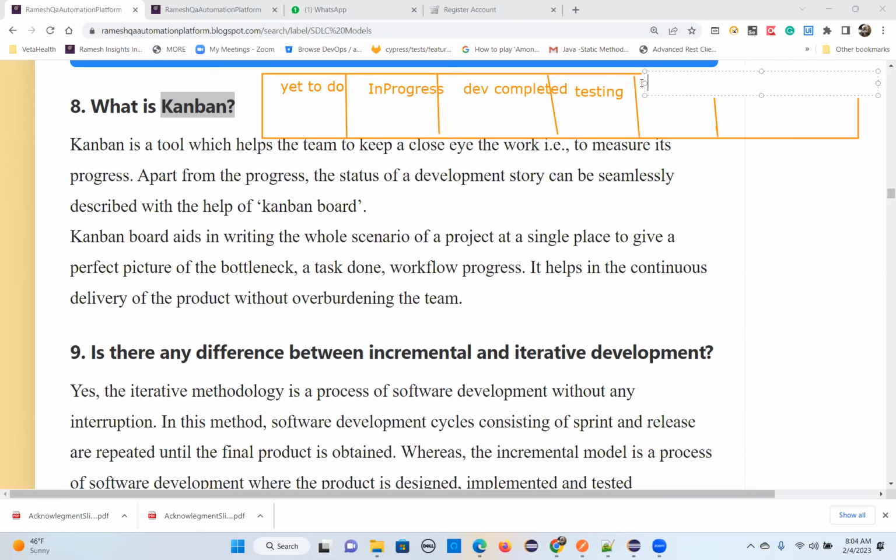So this is review. Then finally it is completed and you can say done. So this is how these different statuses take place, and all these statuses will be applicable for each team member who is having the task. So each task has to go through this many statuses. So that's the Kanban dashboard visualization of your task.